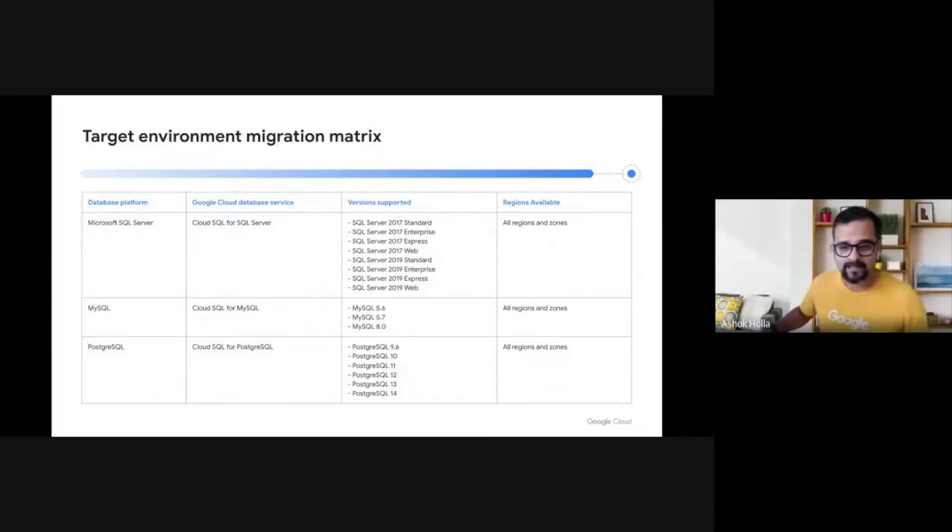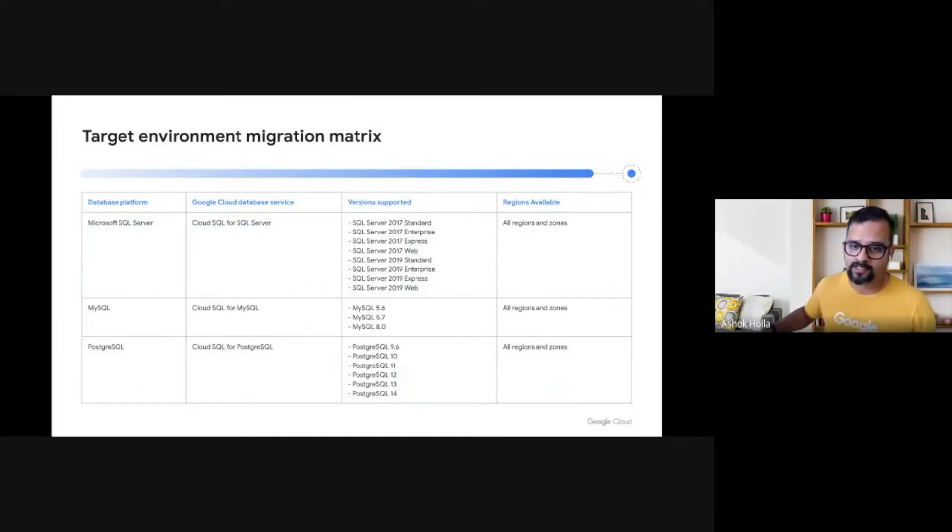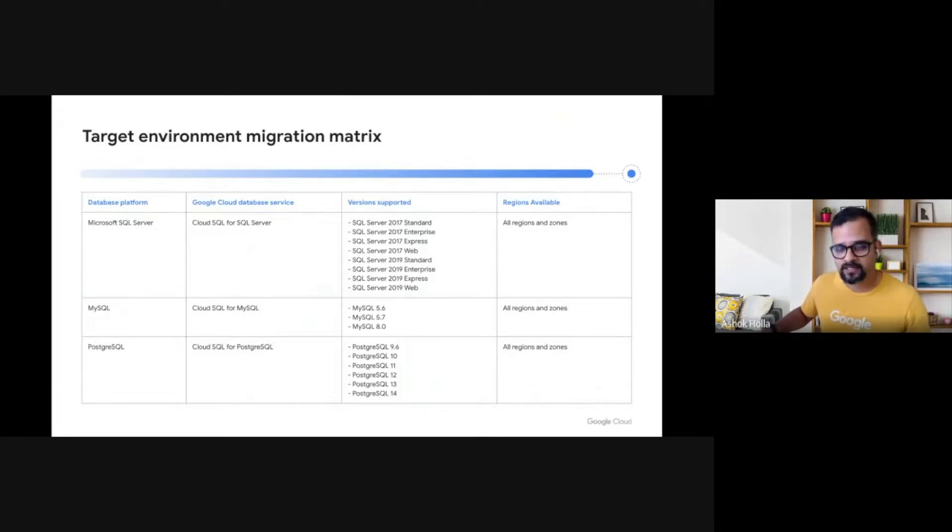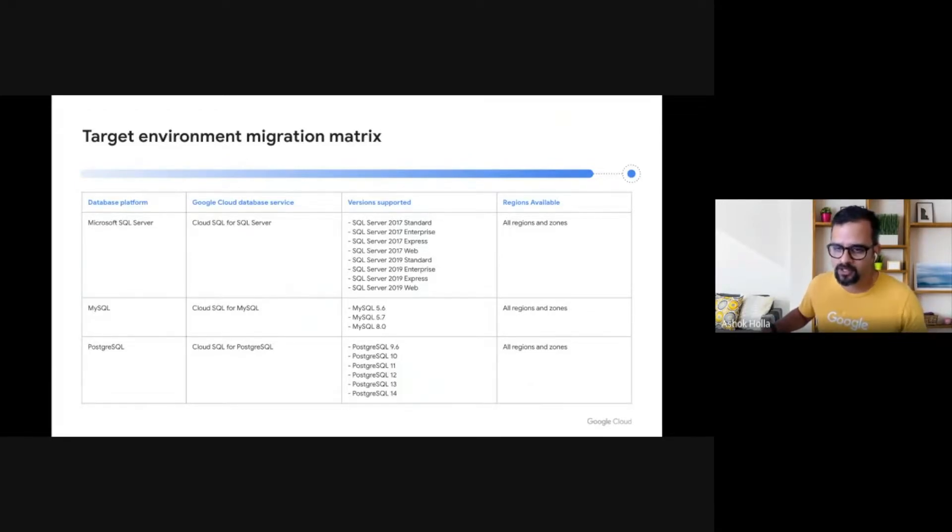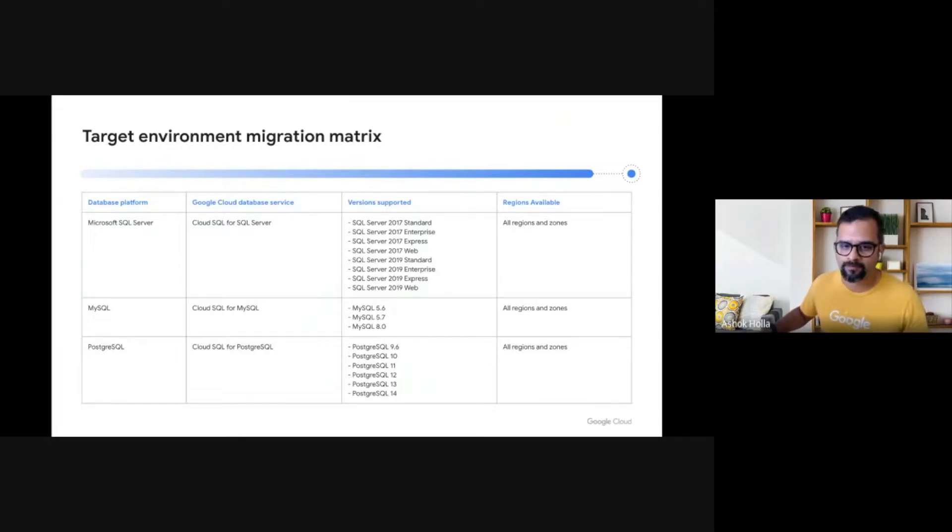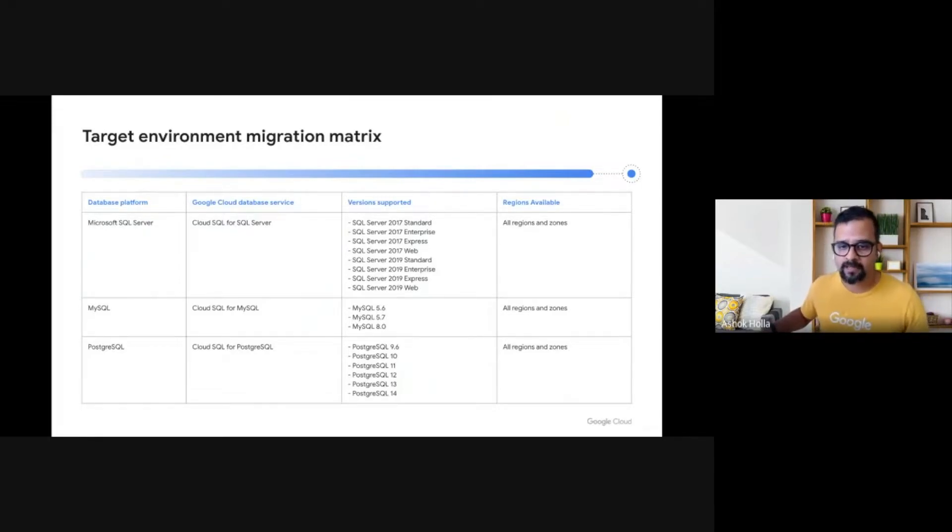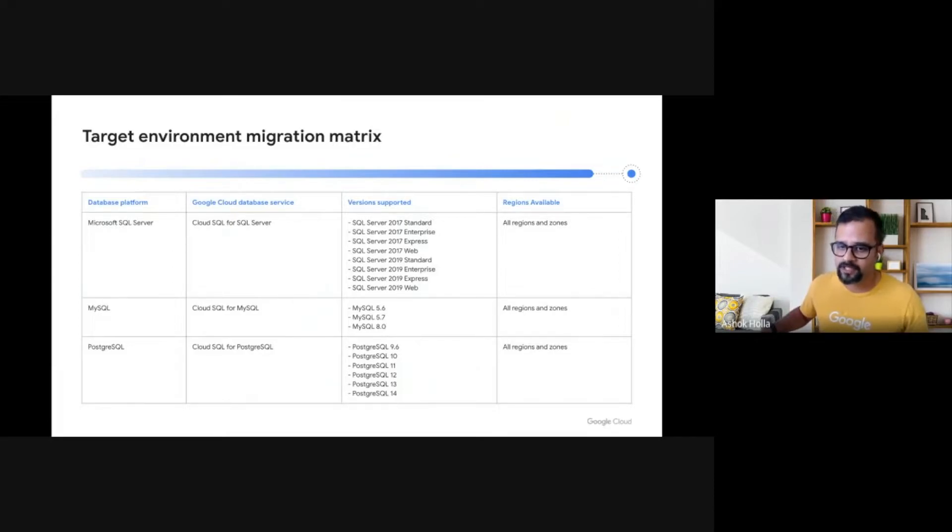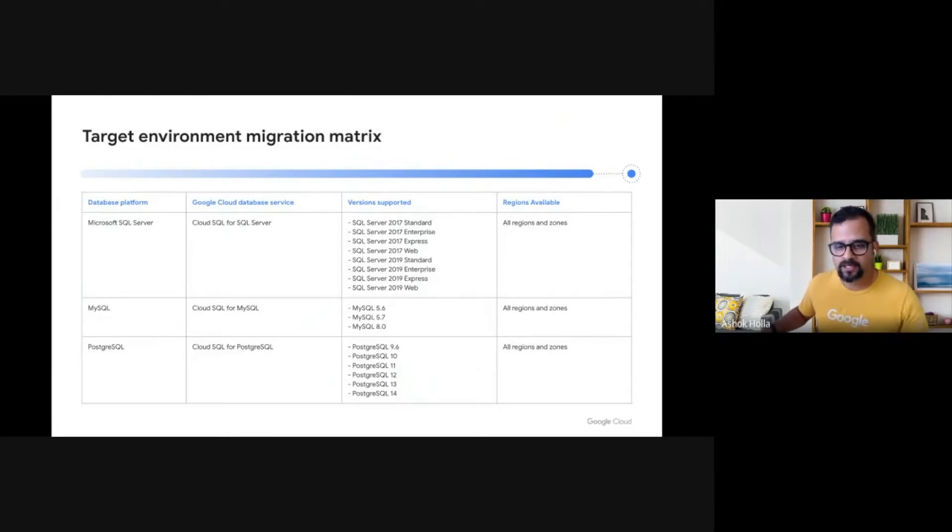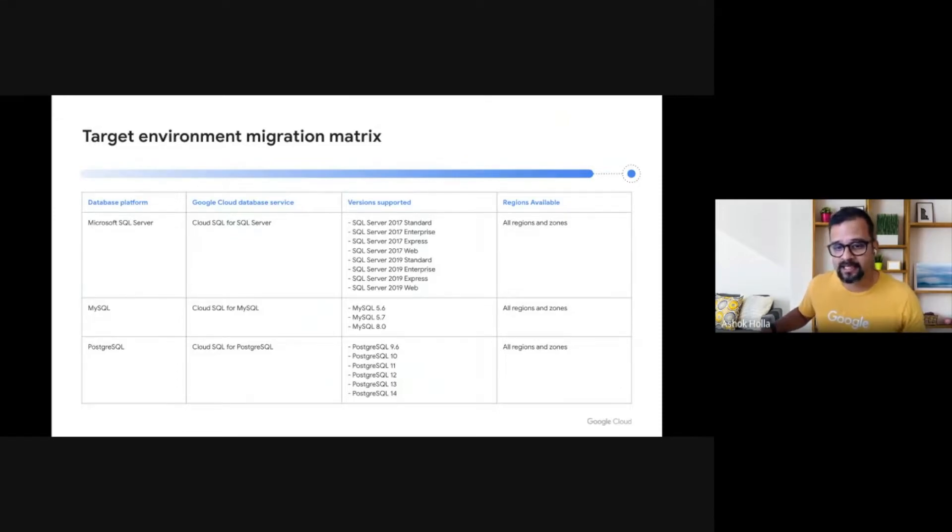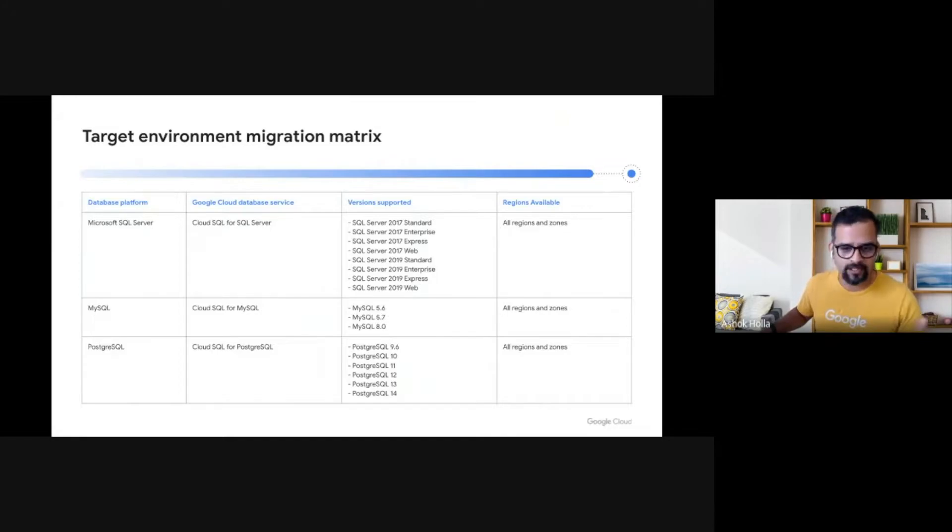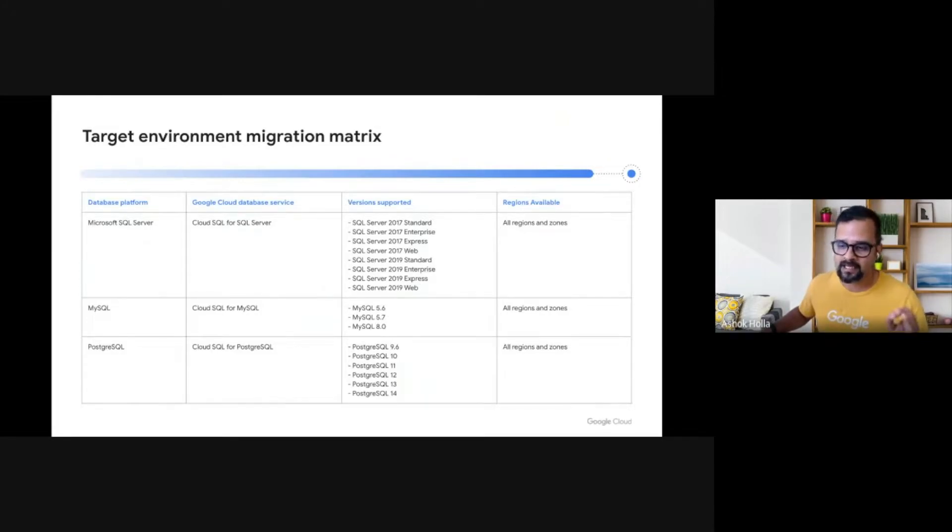Sure, Eri. As Eri mentioned, the assessment report provides us insights into the existing database landscape, database type, version, and usage statistics. In this phase, we use assessment knowledge and decide upon our target platform. Cloud SQL is a fully managed database platform and supports three DB engines, Microsoft SQL Server, MySQL, and Postgres. The versions it supports are listed here. In this session, we are migrating a self-managed database running Postgres 13 and Cloud SQL supports Postgres 13. So this goes into our TDD as our target platform.